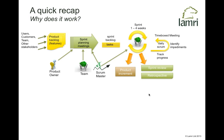A quick recap on why agile works. In a typical agile approach, you've got a development team, a scrum master whose job is to coordinate, organize, remove obstacles, and coach the team, and a product owner who acts as a bridge between users and the development team. You've got a product backlog — a wish list of everything we want the system to do — and a sprint planning meeting. We run a sprint, taking user features off the backlog, expanding them just-in-time, having discussions with users about what we actually mean and how we know when we've done it — defining the test criteria.